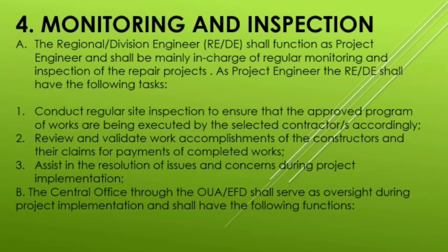Now, let us have the monitoring and inspection. The regional or division engineer shall function as project engineer and shall be mainly in charge of regular monitoring and inspection of the repair projects. As project engineer, they shall have the following tasks. 1. Conduct regular site inspection to ensure that the approved program of works are being executed by the selected contractors accordingly. So sometimes ito po yung nasa-sacrifice, especially if malayo yung area.